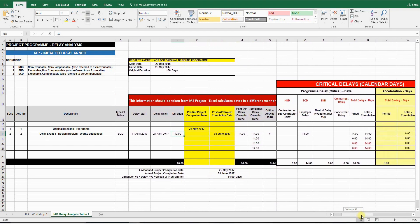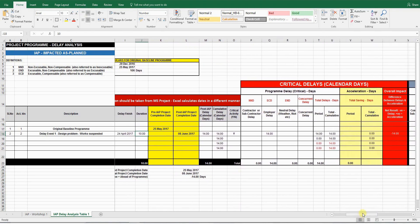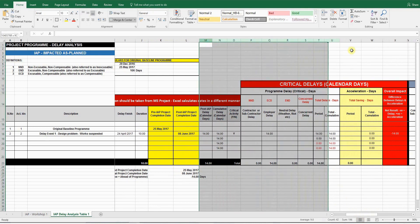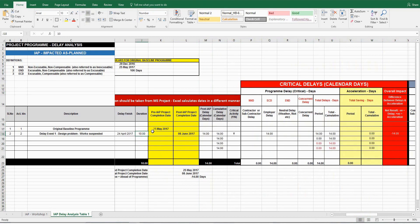I'd just like to mention that when you move on to this section here, everything will be in calendar days. So this 10 days translates into 14 days of extension of time. Because when you submit a claim for an extension of time, it's based on calendar days, not working days.